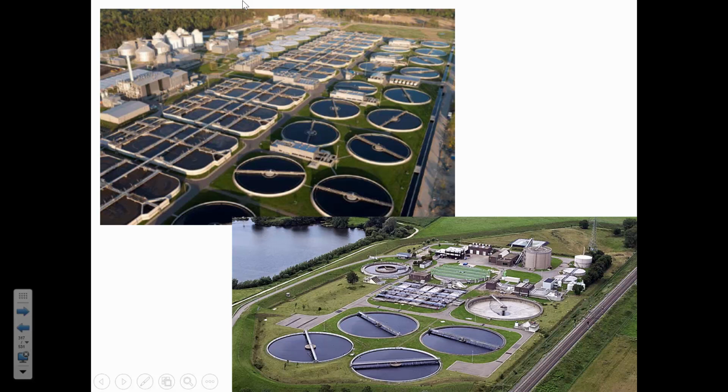One that jumped out in my mind is like a high-rise tower. And so the cost of a high-rise tower that's 500 feet tall, thank you. The cost of building a 1,000-foot tall tower is going to be well more than double. It's not going to be that you get a discount because you made it even bigger than before, but because you're having to add additional structural reinforcement to the lower layers in order to support the upper layers. It actually becomes exponentially more expensive the taller the building becomes.